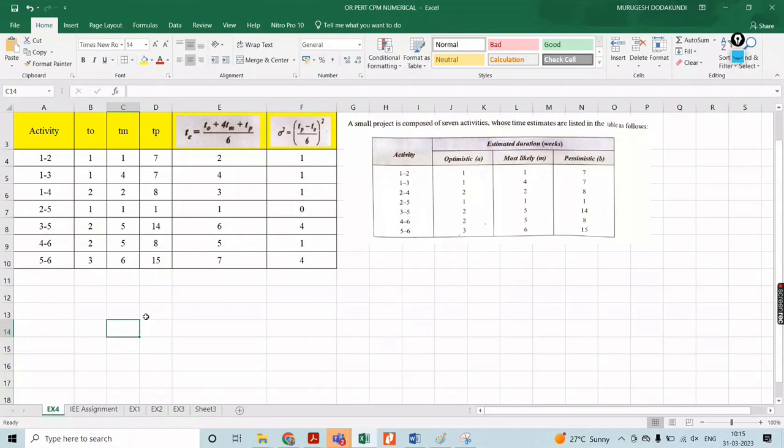First you have to make the evaluation of the expected time required to complete that particular work by knowing the values of T0, Tm, Tp. Once you know these values, make the evaluation of Te and the variation sigma. Once you did these two, then you have to draw the network. Because T0, Tm, Tp are not the value of accomplishment of that particular time to complete that activity. Keep this in mind.